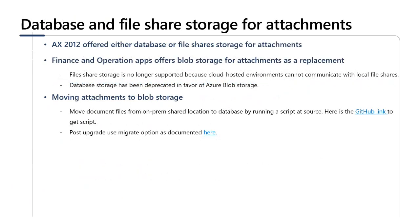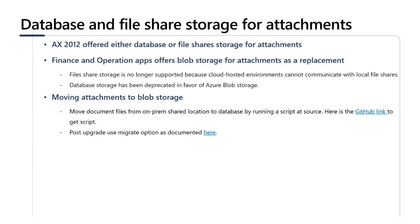The second consideration is attachments. AX 2012 offered two options: storing attachments in the database or on file shares. Finance and Operations offers Azure Blob Storage as a replacement. File share is no longer supported because Finance and Operations lives in the cloud and cannot communicate with local file shares. Database storage has been deprecated in favor of Azure Blob Storage for cost and performance reasons. If you used file shares, you must first move documents from the file share into your AX 2012 database using the provided GitHub script, then use a post-upgrade migration option to move the files from the database to Blob Storage.